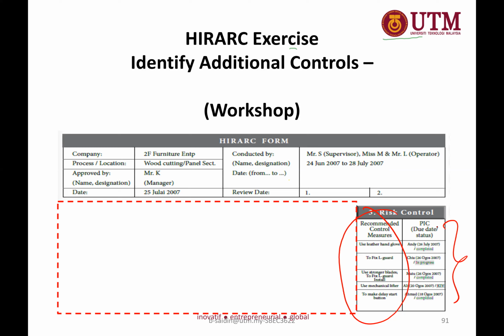The organization basically calls a different company to come to the office and do this kind of exercise, and then they will produce the report, and at the end of the day you need to pay them. Okay, so in organizations like JKR in Malaysia nowadays, for projects above, I think, 40 million ringgit, it is a must that they go through the risk management exercise.